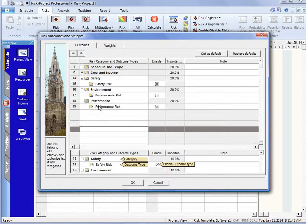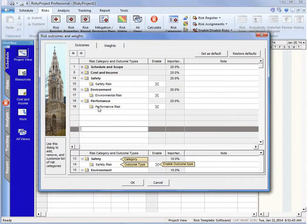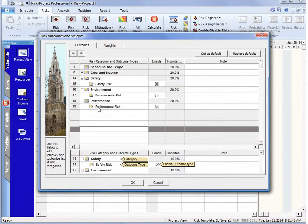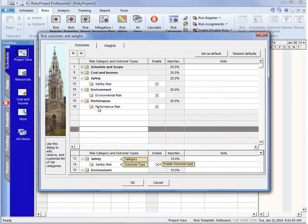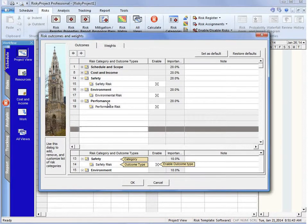So under performance, we could actually have multiple impacts under there. We could have a low, high, or we might want to characterize it in a couple different ways. But when we roll up the impacts in the analysis, it will all be rolled up under performance.